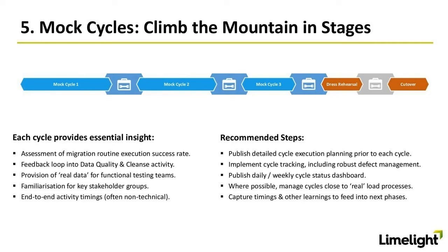It's also an opportunity to familiarize key stakeholders with what they're going to need to do in that final cutover window on the right-hand side. So every time we run a mock cycle, we should be trying to do it in the way that we expect to do it ultimately as part of our program implementation. And so it's an opportunity for people to be involved, understand some of these understandably alien concepts for most people, particularly business people.